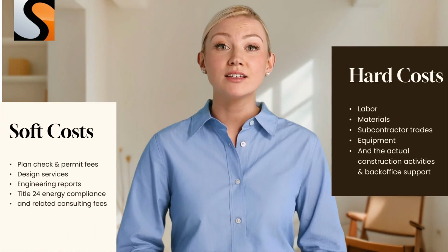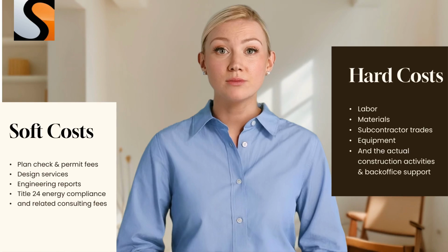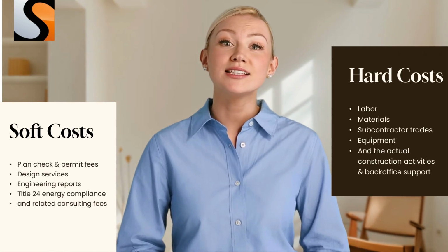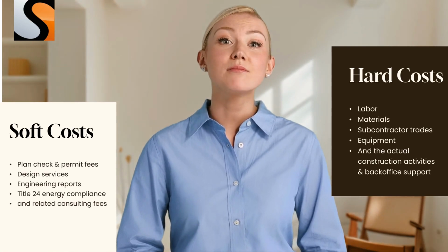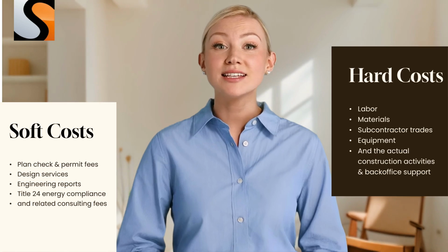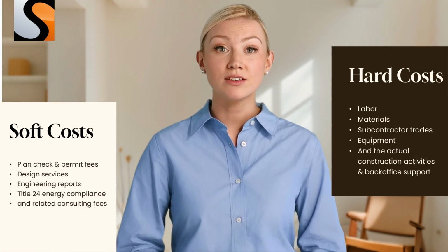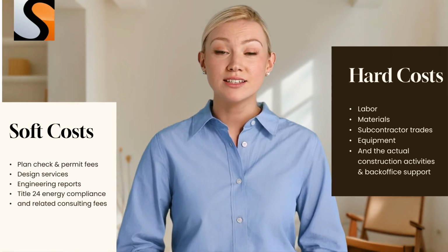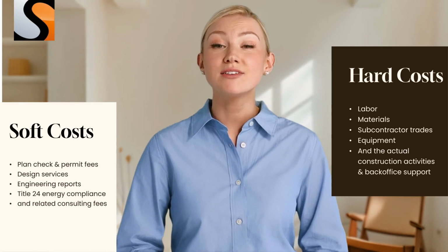For your understanding, we break project costs into two categories. Soft costs include plan check and permit fees, design services, engineering reports, Title 24 energy compliance, and related consulting fees. Hard costs include labor, materials, subcontractor trades, equipment, and the actual construction activities such as back office support for your project.